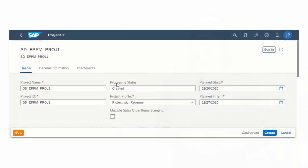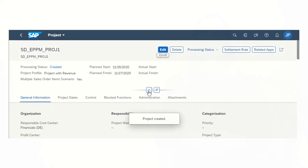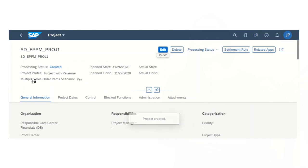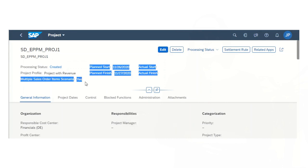When you create projects with revenue, you can now make use of the multiple sales order items scenario. Selecting this checkbox allows you to bill additional products or services to the same billing work package. Instead of a one-to-one relationship, you can now assign one billing work package to multiple billing and pricing relevant sales order items in sales, providing you with more flexibility to ensure project success.